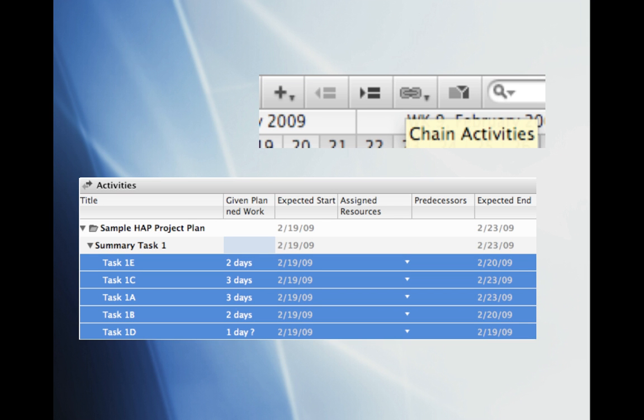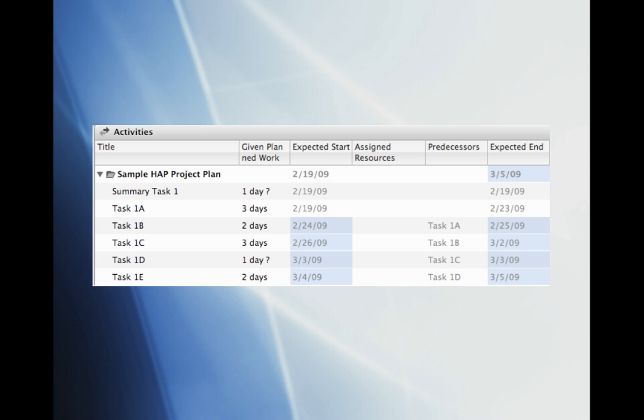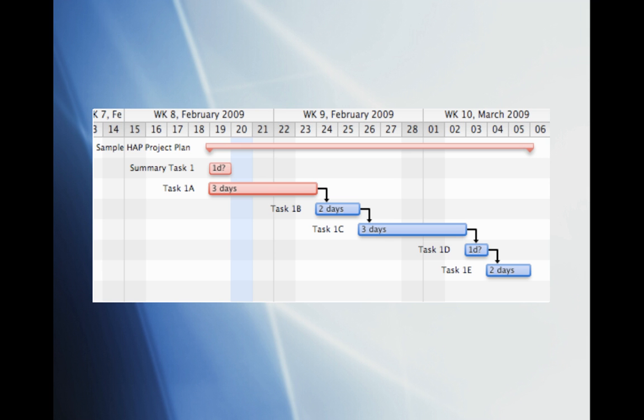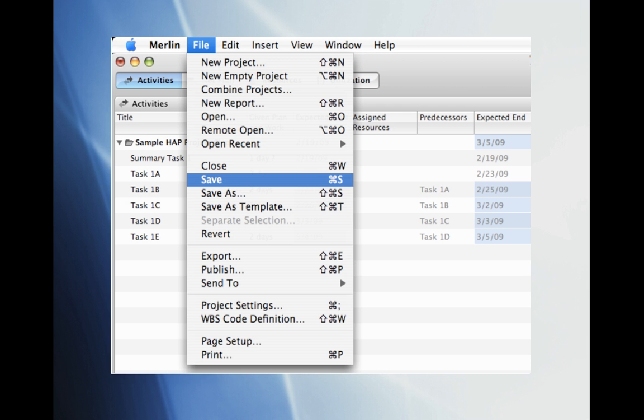Now we will want to link the tasks together so that the task dates will correspond to the sequences of the tasks. To do this highlight all 5 tasks and click on the Chain Activities button located near the search bar. Once the tasks are linked, you'll notice that the dates have been adjusted accordingly where Task 1A will start on the 19th and end on the 23rd. Task 1B will then pick up and start on the 24th and end on the 25th. You can see also the graphical representation of each task on the graph side. After 1A, you'll see Task 1B will start on the 24th and end on the 25th. We'll go ahead and save our work to confirm the changes we've made.